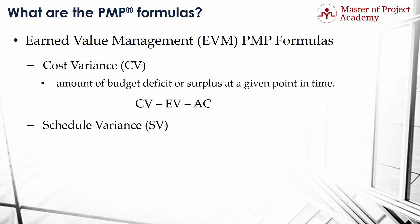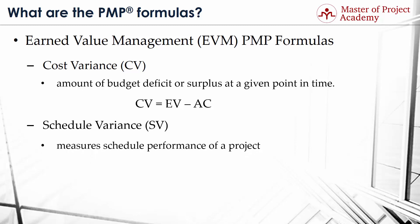PMP formula number 4: Schedule Variance or SV. Schedule Variance's aim is to measure schedule performance through the difference between the earned value and the planned value. Accordingly, its formula is: SV equals EV minus PV.